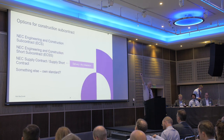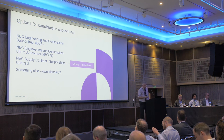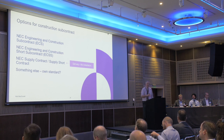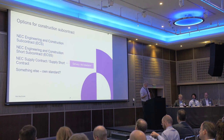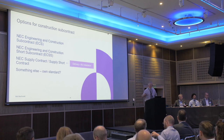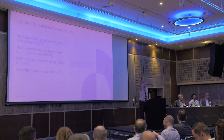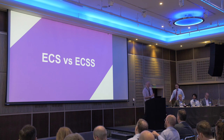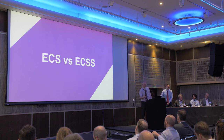Your options are: use the ECS — Engineering Construction Subcontract; use the short subcontract; maybe the short supply contract if it's just supply with no installation; or maybe still use your old standard contract because you've been using it for years. Simple comparison slides between ECS versus short contract — really comparing ECC versus short contract as they're essentially the same, barring a few timescales.